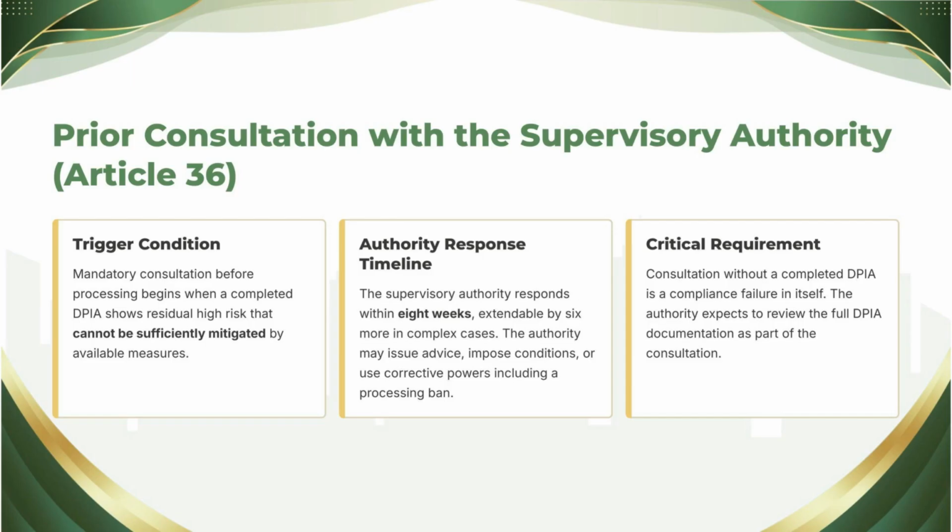2 professional notes. First, the sequencing trap. Arriving at Article 36 without a completed, honest DPIA is itself a compliance failure. The consultation exists to review your assessment, not to replace it. Second, the timeline lesson. 8+ weeks of regulatory review belongs in your project plan from the start. I've seen launches wrecked not by the consultation's outcome, but by nobody having budgeted for its existence.